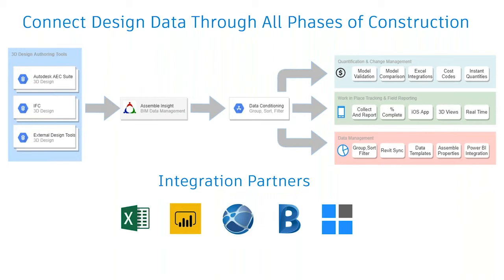And that can allow you to look at percentage complete, allow you to look at budget utilization. This can all be done from an iOS app, so you're able to pull these models up, whether with or without internet on site, and look at those 3D views and in real time update all of those parameters and pieces of information that the field team might need to understand.